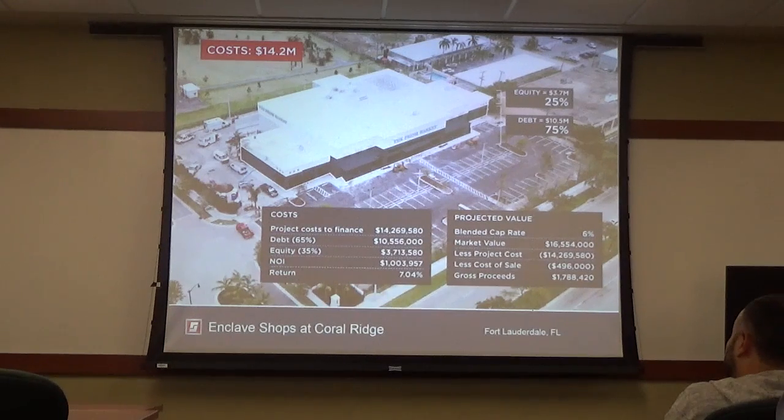Is that with the on-site contractor, or is that with Styles? Styles Construction did it. Do you have a certain agreement you use? Was it lump sum, or was it open book? This one was GMP, so you got to see their numbers. And then we had a split savings, and they had the benefit of the buyout if they got any, then we had a split savings at the end.